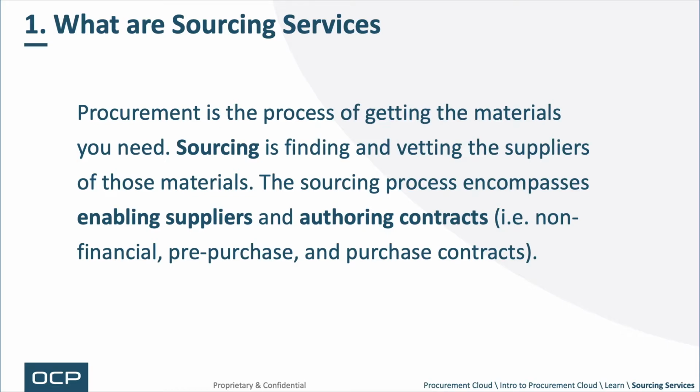First topic, what are sourcing services? Well, procurement is the process of getting the materials you need. Sourcing is finding and vetting the suppliers of those materials. The sourcing process encompasses enabling suppliers and authoring contracts. When we say authoring contracts, there are different kinds. Pre-purchase, one is non-financial, so think about a non-disclosure agreement. And one is called a master agreement: master of hosting, master of professional service, master of end user license, etc. Those are pre-purchase agreements. And then of course you have the purchase contract, sometimes called an MPA, an MGA, or an SOW if you're in services.